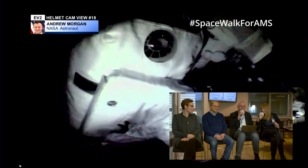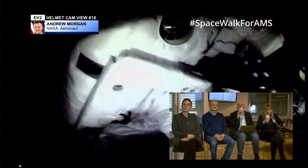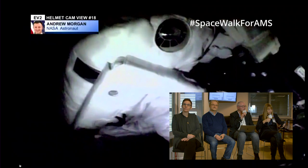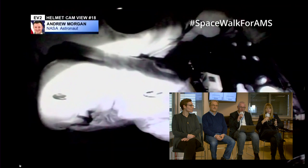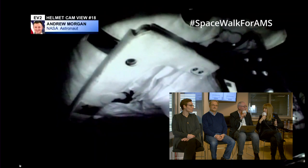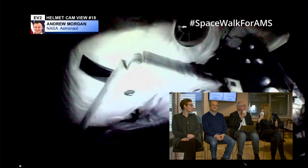After Luca has connected all the 8 AMS fittings, a few more days will pass, and then the next step will be verifying that all the fittings are really pressure tight, and only at that moment will we be able to switch on the pumps and have the CO2 fluid circulating, namely start to cool the system in nominal condition. As of today we verify only the UTTPS itself, the big box that has been installed up there. In a few days we will verify the system, namely the UTTPS plus the rest of the system and the tracker, to verify that the full system is up and running.